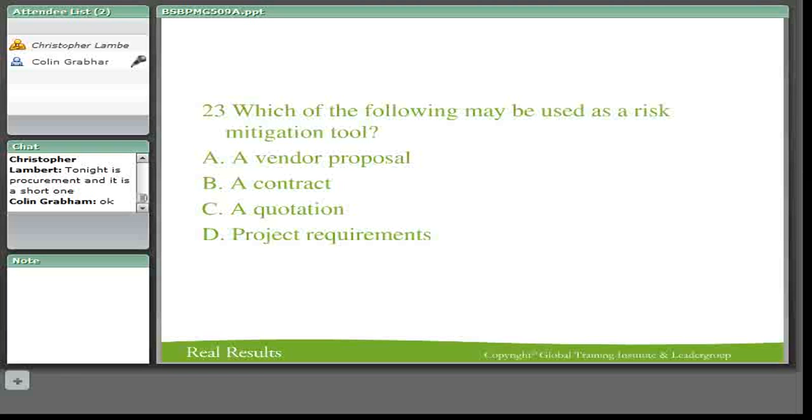You'll have first call on the pricing for the change control. If we deem it's gone over a certain amount, then we're allowed to go and find somebody else to do something like that. And that's in your contract. And there you've mitigated the risk of discovering hard rock, this is how you're going to deal with the situation.